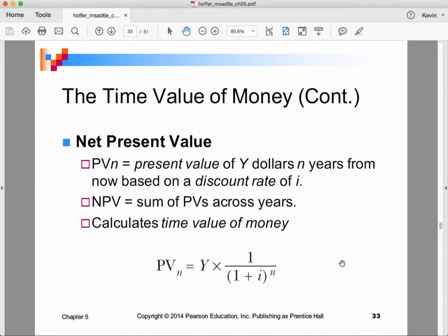So there's a formula for net present value, and I'm happy to say that it is a common function on business calculators, and it's a common formula available in spreadsheets like Excel. And so typically what you have to know is how many periods there are, how many years or months, and you have to know what the interest rate is per period, year or month, and you plug it in and you get the answer. You get the net present value.